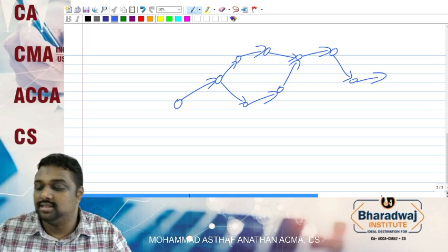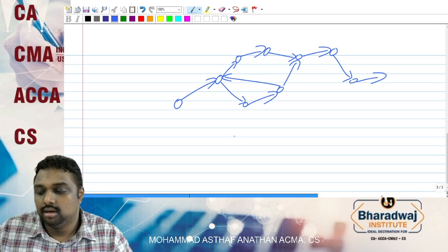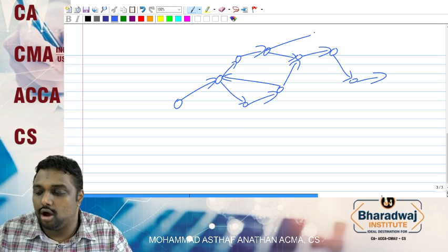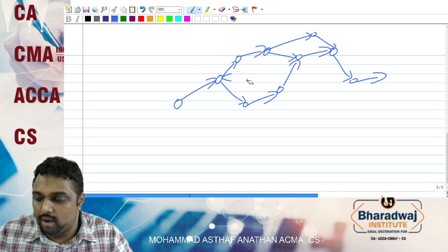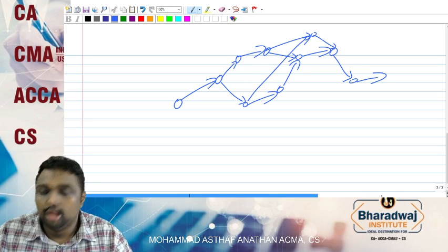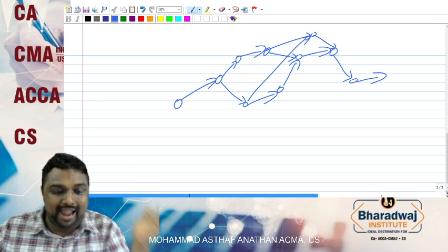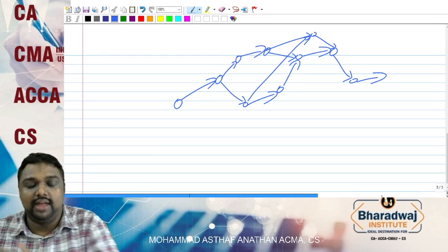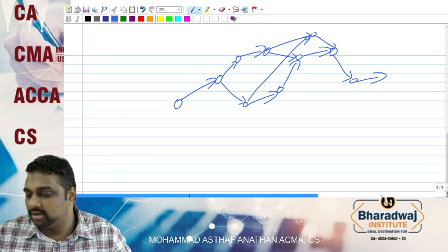The main rule is that we cannot draw a network backward. Similarly, we cannot draw an activity over another activity. If you want to connect that activity, you cannot draw over one activity. So you cannot come backward; you have to go that way. That is the clue we have discussed.